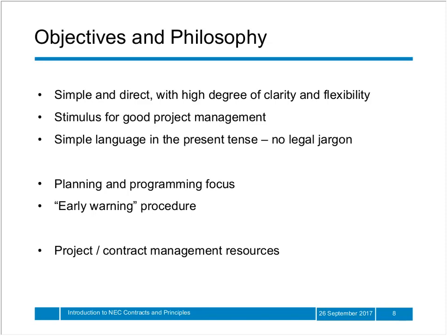Similarly, the risk register and program are intended to be constantly evolving and to be updated to help actively manage events and their consequences. One of the main points to note is the additional project management and administrative resource required on both sides to not only manage the project but also to manage the contract. Because NEC philosophy is that good contract management is intrinsically linked and essential to good project management. So without this resource being allocated and the contract actually being used in this way, then many of the benefits of the contract will not be realised.